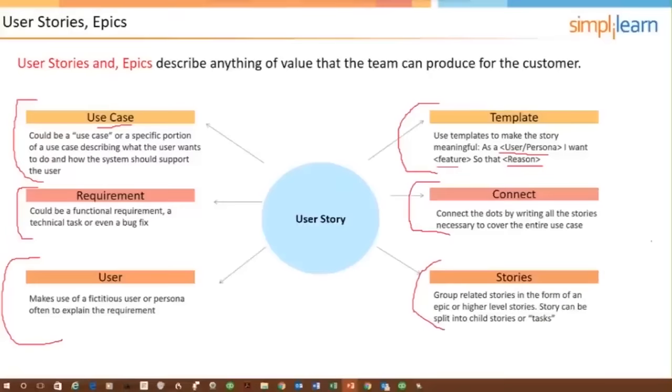So you have themes up at the top. That's the biggest grouping, if you will, used primarily for high-level planning purposes. Then you have your epics, which are large user stories, low priority, and they're going to have to be broken down into smaller user stories. Like in the question that we had at the end of the last section, where the product owner needed something done and the team said, well, based on the size of this user story, it's going to take 3 sprints to do.